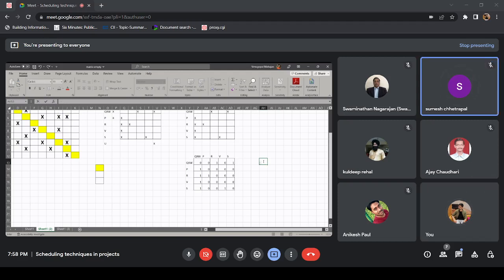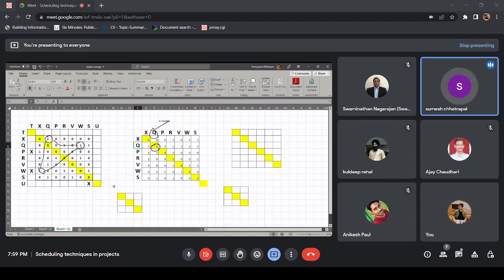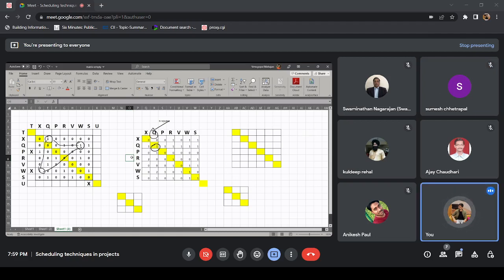Pardon, sir? Okay. After that, we have to again go for the partition process for seeing the empty rows and empty columns. And after the partitioning, again we have to go for the multiplication for the active matrix. Is it a correct process, sir? Yeah, let me just add here.